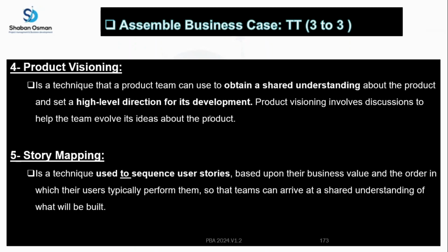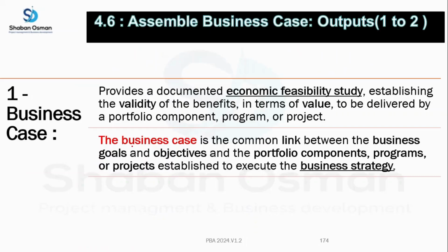But what about story mapping? It's a sequence. Story mapping is a technique used to sequence user stories based on their business value, and in addition to that, based on the implementation sequence during the project lifecycle.